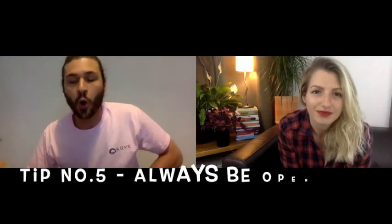And just to add as well, I think we're also trying to say it's better to have the pricing a bit higher, but then in the end save money, than have the pricing a bit lower and then go over. So yeah, we always put a 15% contingency on as well. So that's just in case, because you never know. Things can crop up. Exactly. And that's definitely a good point. But yeah, I think always be open and transparent.